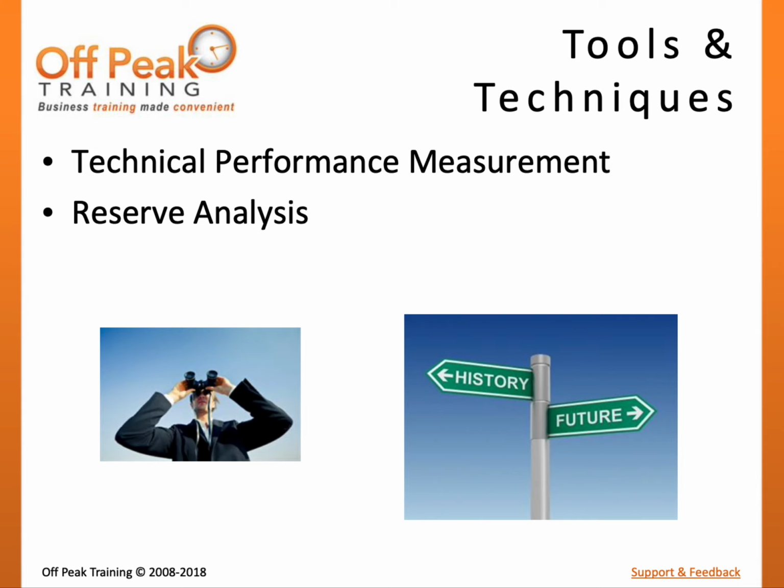For example, as the team approaches the fall season, the probability of a hurricane will decrease. Similarly, the estimated impacts of identified risks can also fluctuate. If the price of a commodity drops, the impact of an opportunity may be decreased since the cost savings would not be as high. As probabilities and impacts change, the project team may choose to revisit the qualitative and quantitative analysis processes and subsequently revise their approach to risk response as risks become more or less relevant.